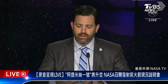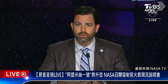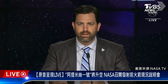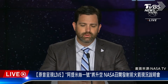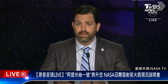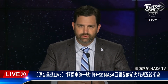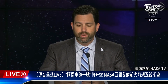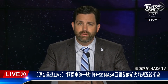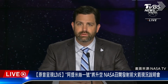Yes, ma'am. It's a good question. So right now, our flight termination system is the pacing function for needing to roll back after this launch period, and it's based off retest requirements. The range says every so many days prior to launch, you have to test that flight termination system. Right now, we worked with them. We provided data for a little over 20 days since we tested it to launch time. We believe we would need to roll back and retest that system just to meet the range requirements. So right now, after 9/6, we'd roll back and retest. We don't actually have to replace the batteries until the next launch period, but it's a relatively short retest of the flight termination system just to provide confidence to the range that the public will be safe.